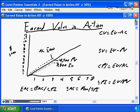We're seeing my earned value is only $3,800. So although I should be completing $4,500 worth of project delivery, because my estimates were a little over, because my team is not working as efficiently, maybe there's some learning curve issues, maybe there's some ramp-up times, I'm not getting full value for my team. My team is delivering a little under planned performance, so my earned value is only $3,800.